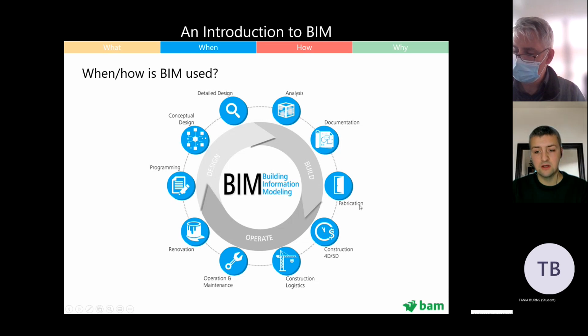Documentation, which we've mentioned, and fabrication. I know that a number of our steel subcontractors will actually use the model for fabrication. So whatever they use to actually fabricate the steel, it uses a 3D model to manufacture it. So their model has to be right, because it's what's used to actually manufacture the steel. What's manufactured matches exactly the model itself, which is great, because it means we've got a really, really detailed model down to the nuts and the bolts, which is quite good for the client to have handed over at the end.